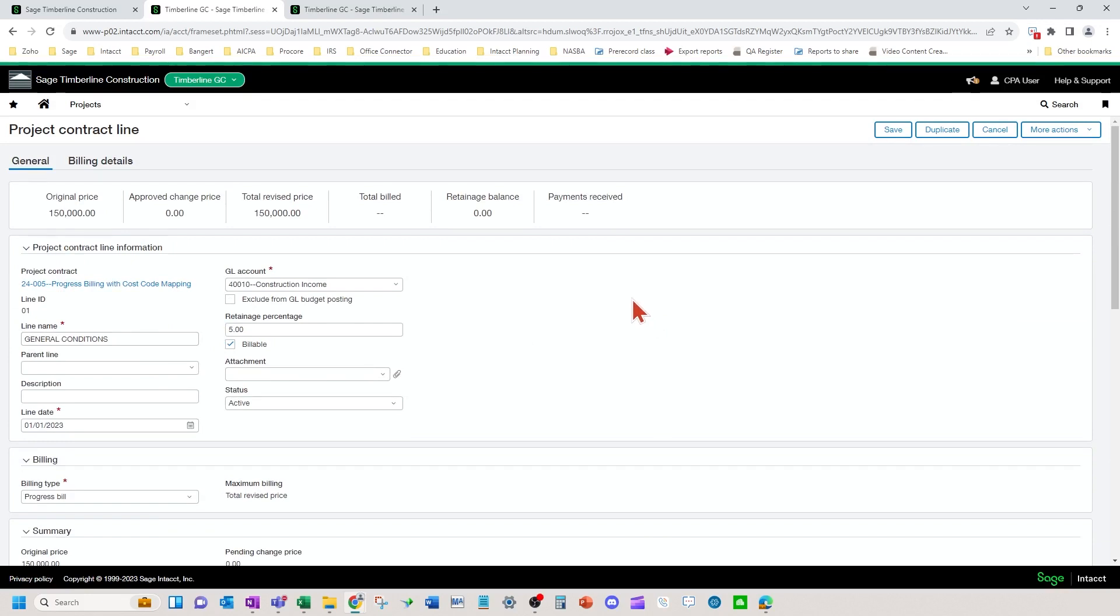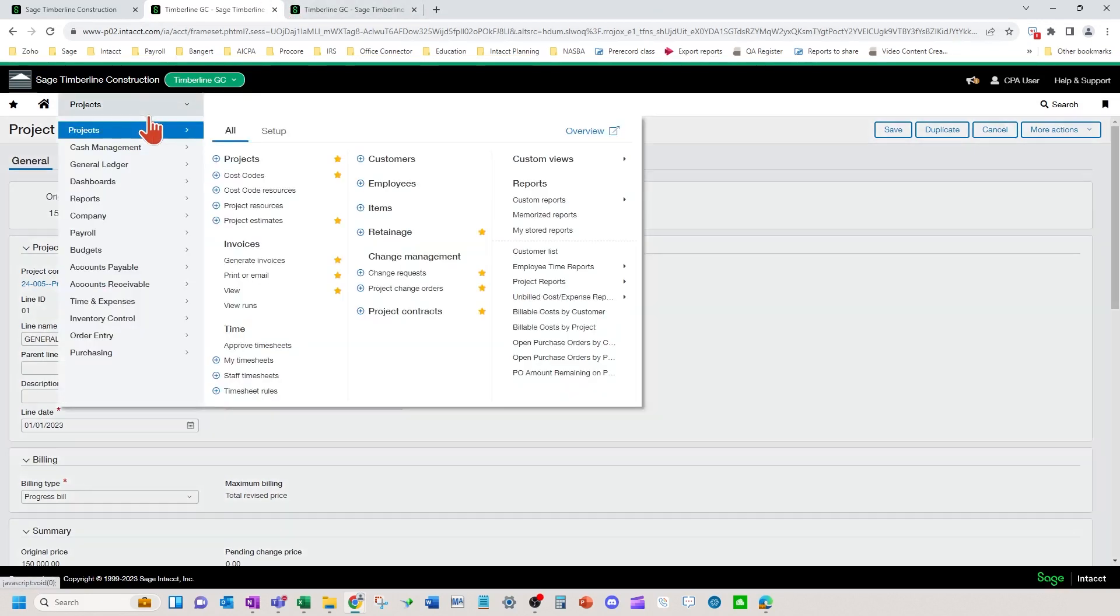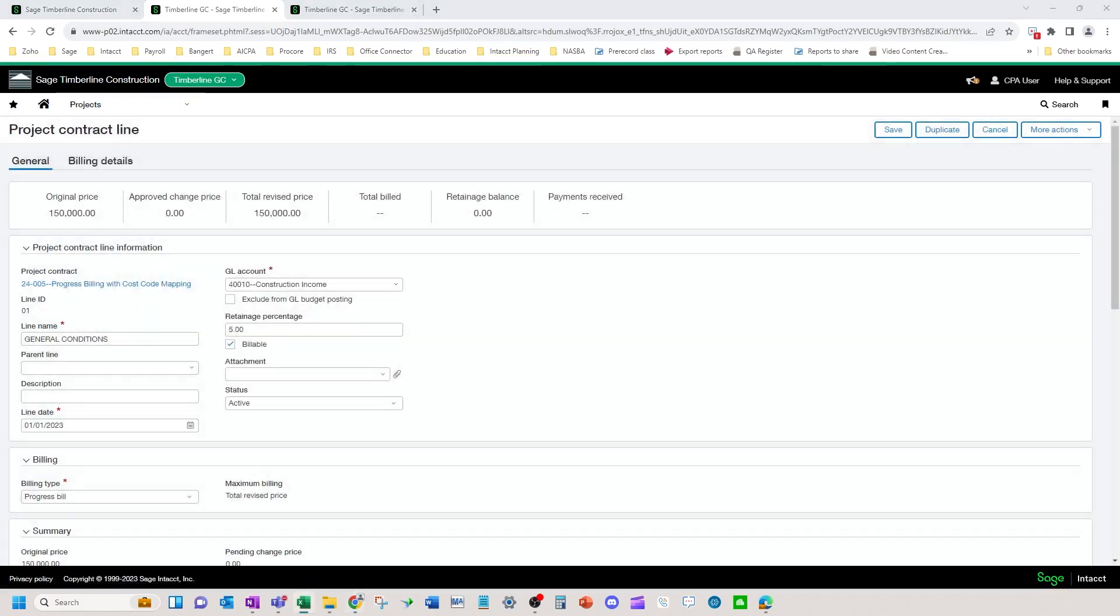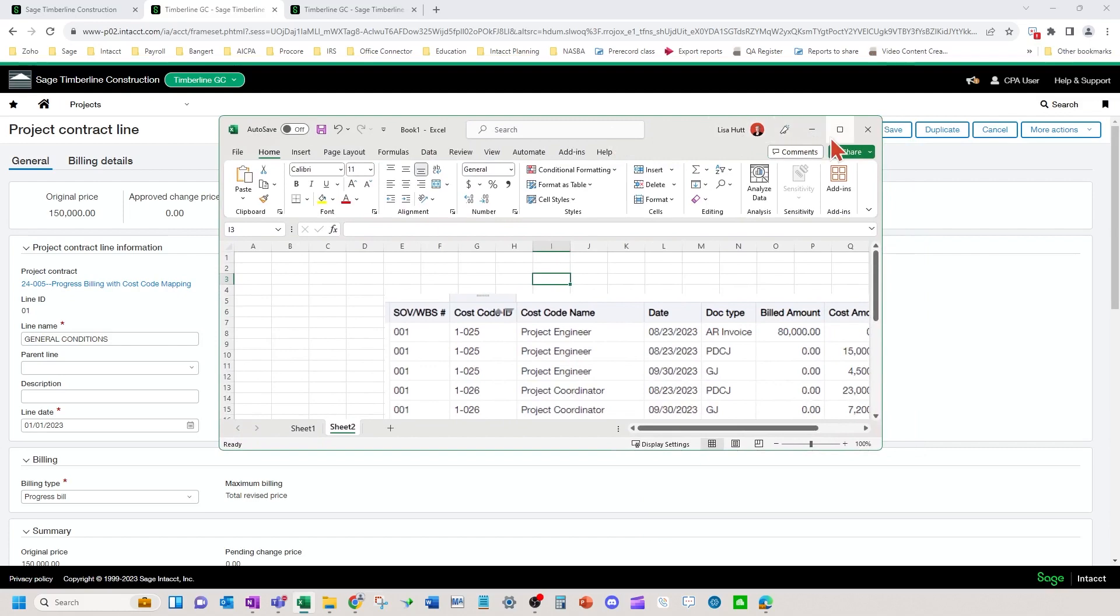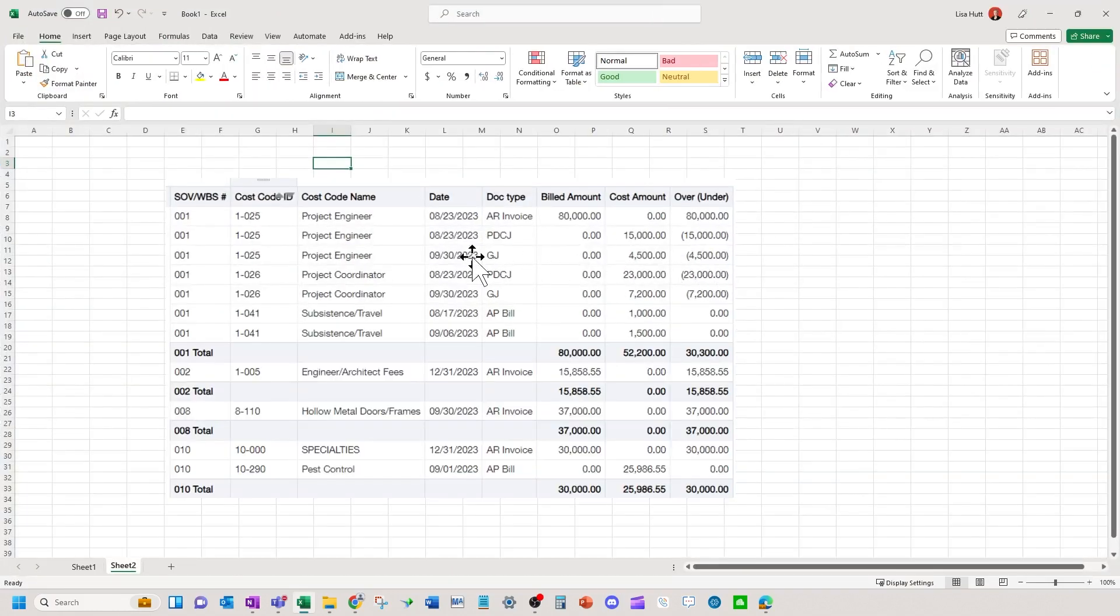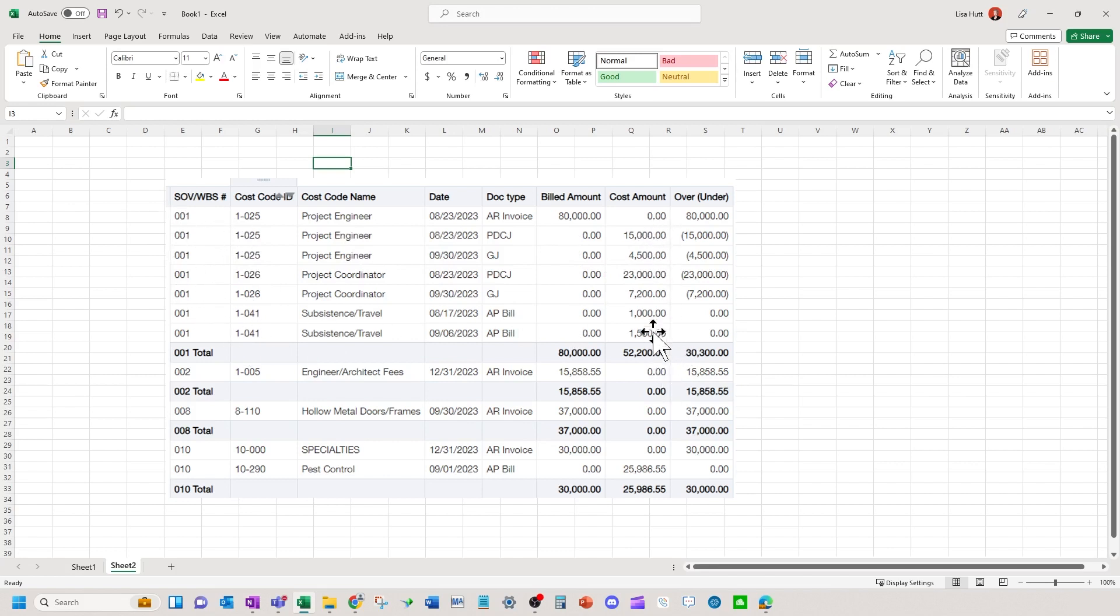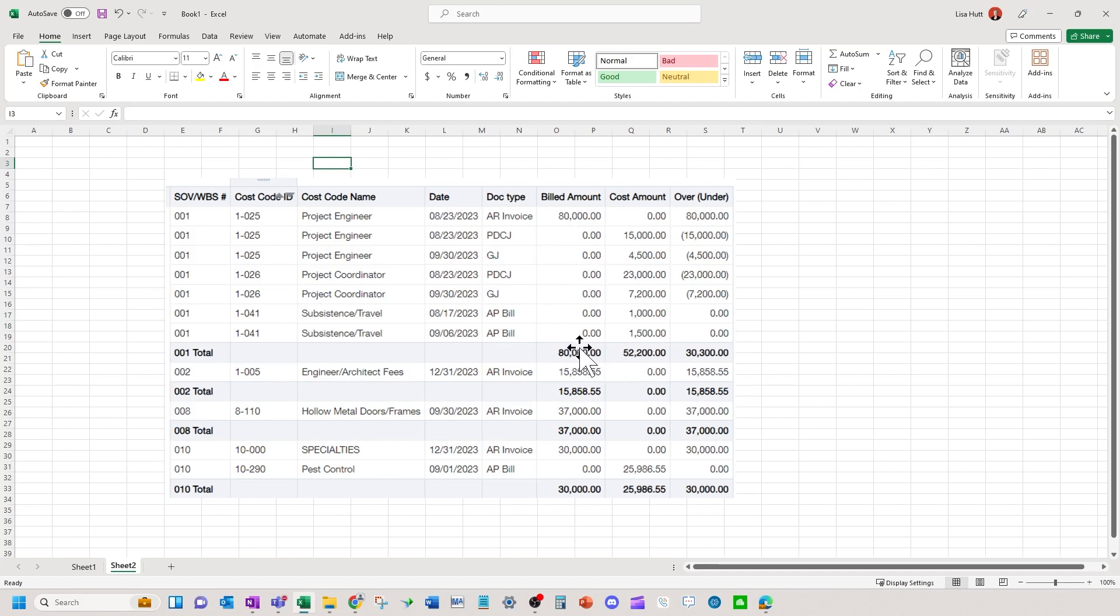So that when you bill and create billing through the system and generate invoices here, the report that has been built will then come out like this. So any costs that I have cost coded on an AP bill or labor, any of those cost entries, if they hit these one cost codes, they're going to be grouped in the 001 or 01 schedule of values line number. So the 52,200 are all my costs and the ones that are with the 01 line. The 80,000 here is what we generated through the billing process. You can summarize this to be just show the totals. So for 01 general requirements, I've billed 80 grand, but I have 52,200 in costs.